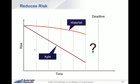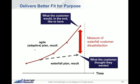And then, kind of lastly, we know that the biggest challenge with our prior practices is the fact that waterfall just leaves the risk in. With delayed system integration, and if you look at a waterfall project from the standpoint of lean, it's a giant batch filled into a system of overly busy people with a fixed deadline. Lean tells you that will be a disaster and that quality will suffer dramatically. And we've learned that. The reason that happens with a waterfall model is all the risk is left to the end. And it doesn't have to be that way. We can march risk down, down every single day. And as we do that, we simply end up in a better place.